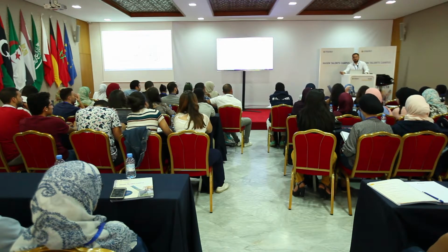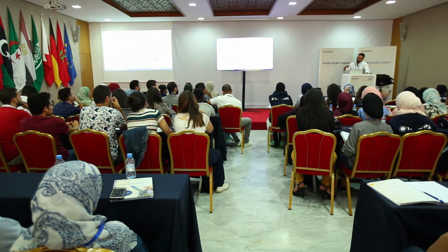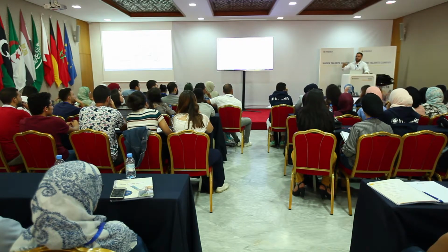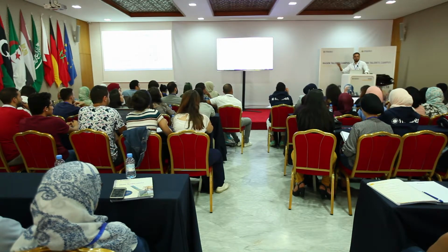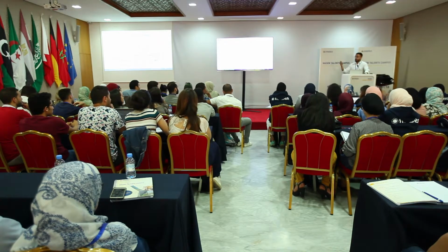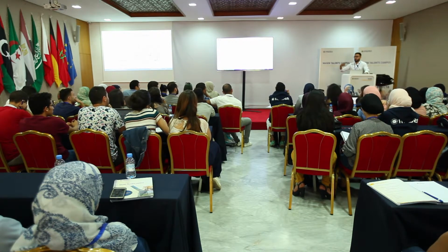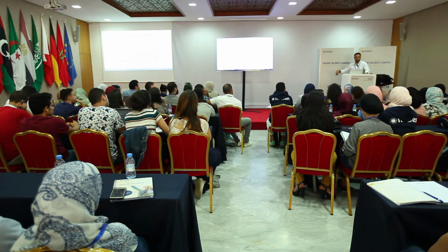Why should the PPA price have a minimum value? Well, let's see. This is a competition, right? If you remember the process that I showed before, this is a competition. You are requested to propose a plant with a bid. And if Masen gets 10 bids, and one is 10 times higher than the other, which plant will win? They will build the cheaper one. So that's the reason why we design for the minimum PPA. We're always looking for the minimum PPA that still gives us profit, everyone in the plant.